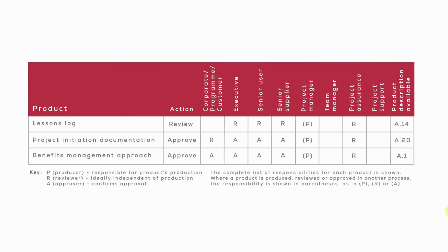lessons have been incorporated. The project initiation documentation, which was produced by the project manager and reviewed by corporate program management of the customer and project assurance, is now approved at this point in time by the project board, as is the benefits management approach, also approved by the project board at this point in time.